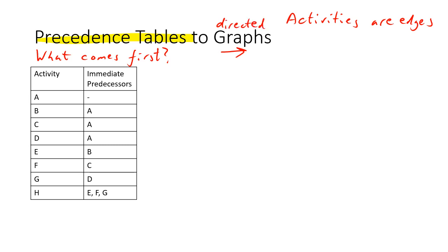All right, now in the book, they tend to work backwards. I think you can go backwards or forwards. I like to go forwards. I'm going to start at the start. Now, this dot is our starting point, and everything has to come out of that. So we're going to label that the start. And if you look at the start, this is saying that A is the first thing that comes out of that. And so we've only got one thing coming out. I'm just going to put a straight arrow like this, put a dot at the end, and call that A. But now that we've done A, we can do all of these three things.